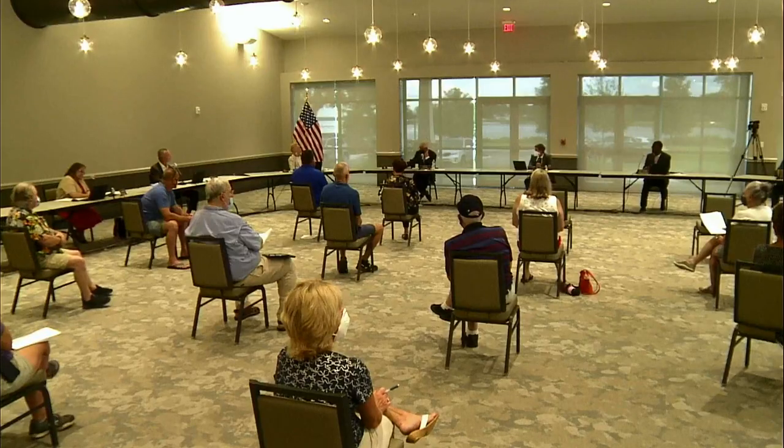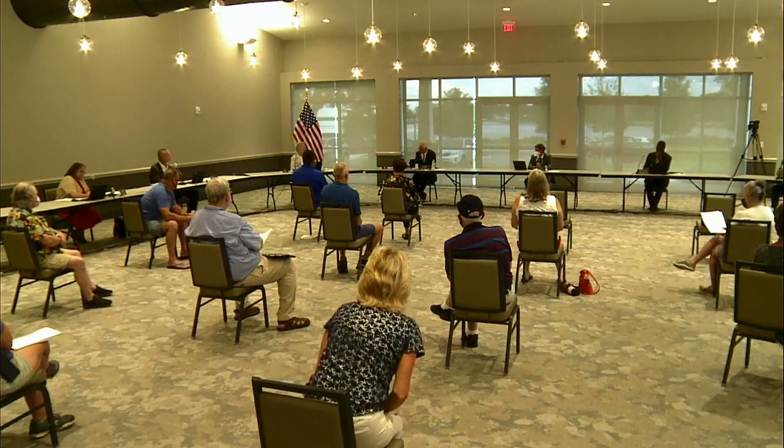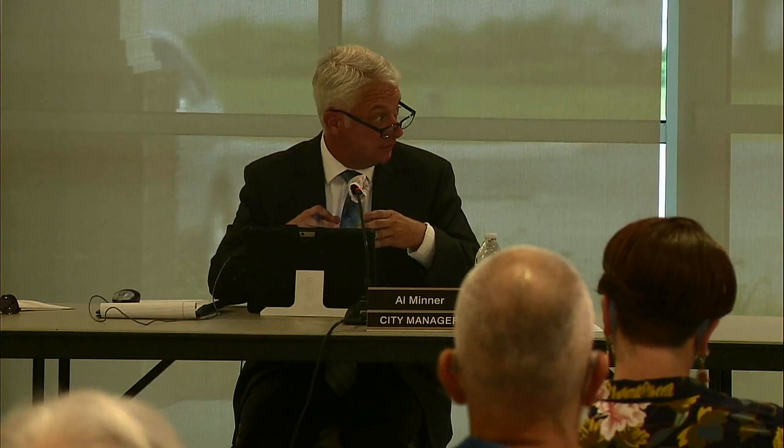Okay, that breaks down to about four questions. So if I miss any of them, let me know. The FAA informed us probably about 12 to 18 months ago that we would need to make certain improvements to the customs facility, housed in Sun Air, to make it compliant with Homeland Security standards. We spent about $30,000 to get these improvements designed, and we put that plan on the shelf until the pending outcome of the situation.